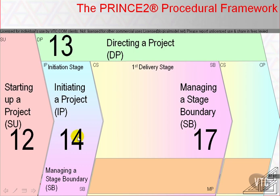The initiation stage is the first of a minimum of two stages. Since it is a stage, it will be brought to an end by four of the five activities of the managing stage boundaries process. Stage boundaries has an activity for normal or abnormal stage end, only one of which will be used in any transition from current to next stage.